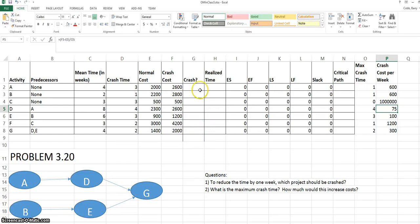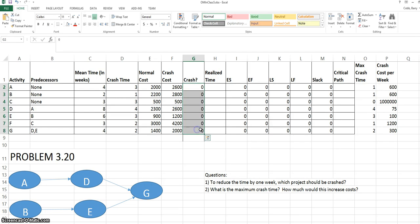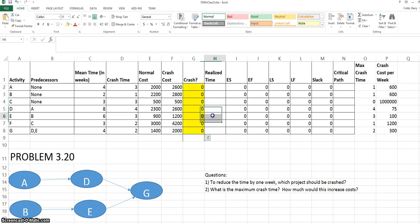The crashing problem is a decision problem. So we'll have decision variables for the crash time of each activity. These will be the cells in column G. We're simply just going to put zeros in these for the moment and highlight them in yellow so they're easily identified.